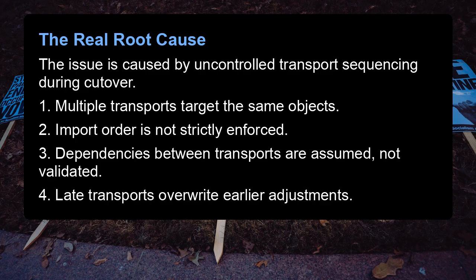The real root cause. The issue is caused by uncontrolled transport sequencing during cutover. 1. Multiple transports target the same objects. 2. Import order is not strictly enforced. 3. Dependencies between transports are assumed, not validated. 4. Late transports overwrite earlier adjustments.